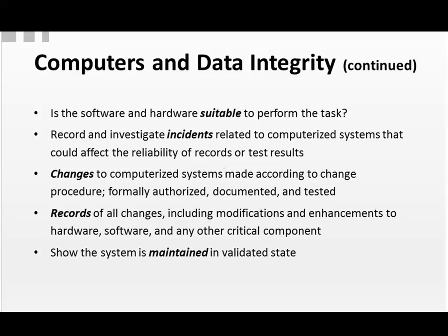Whatever changes are made to a computer system, whether that's code changes, hardware changes, anything that's going to have a significant impact on the system functionality, it has to be done according to a formal change control procedure. It should be formally authorized or approved by someone. It should be documented, and the system should be tested before it's put back into production in the altered state.